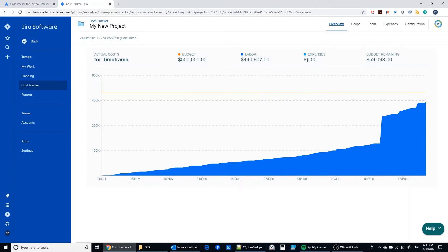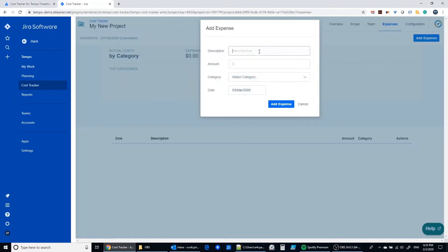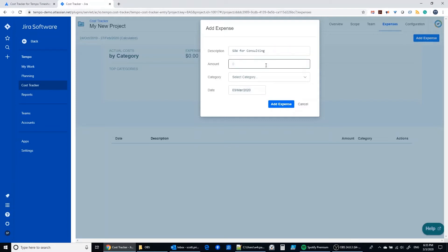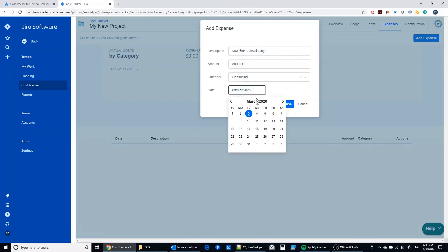Now you see this expenses section here. This is a very simplistic way of tracking expenses. You have this add expense button here and you just type a brief description. So maybe we had to do some consulting work and perhaps that was $5,000 and we don't have any categories in here at present time but we can just start building one. So we'll add a new category called consulting and enter the date at which this expense was incurred and add expense.